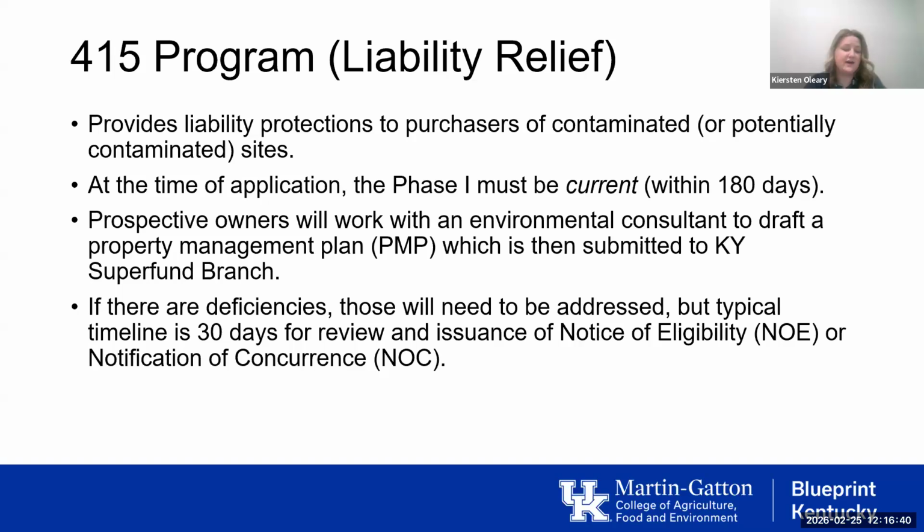And just in terms of timeframes, there is a 30-day review for those applications, but if there are deficiencies in that property management plan, that could be extended a little bit. So we will talk a lot about that next month, all of the 415 stuff, but just wanted you to know that it has a timing element as well that might need to be considered when you're working on your brownfield redevelopment project.